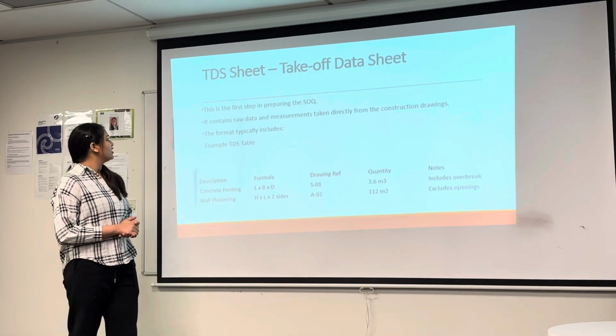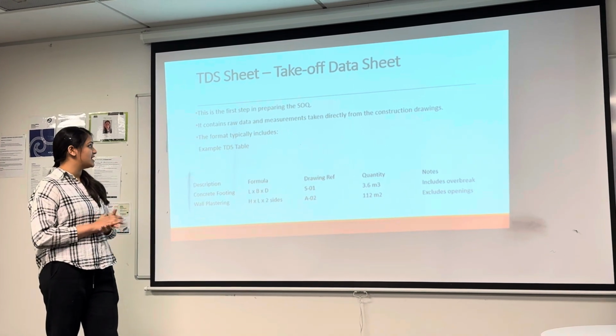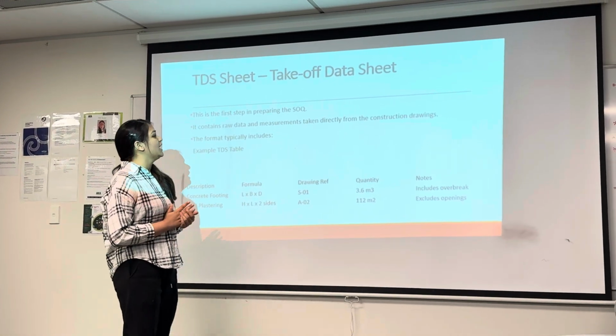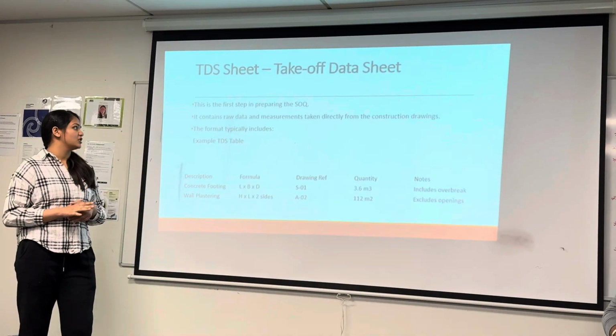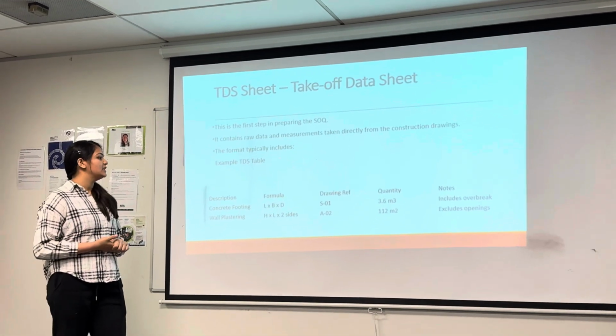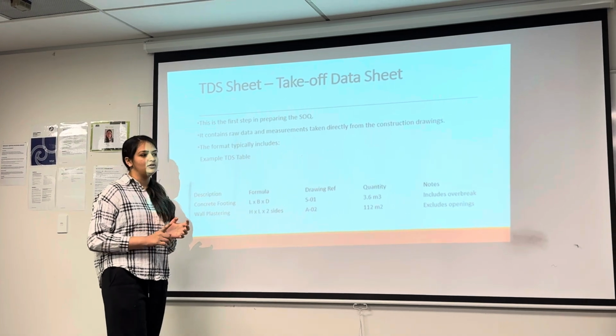TDS sheet, takeoff data sheet. This is the first step which we use while preparing the SOQ. This contains the raw data, which is directly taken from the construction drawings. Also, the table typically includes description, formula, reference drawing, quantity and notes.